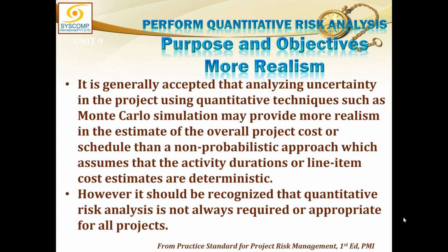So 1.5 tells me that one deviation size is approximately 1.5, because 1.5 is a state calculation. It has to be, going through some other details of probability, turned into the standard deviation. But just for state calculation, I would say if 3.83 is the center, then I can move ahead by 3 deviations or move backwards by 3 deviations, and the size of my one deviation is 1.5.